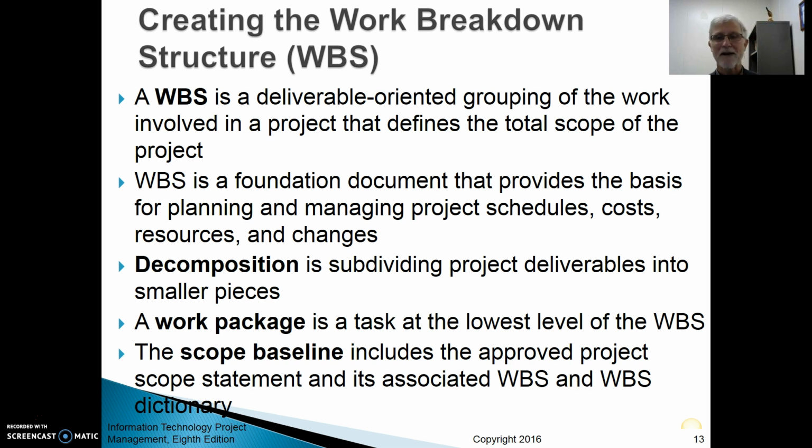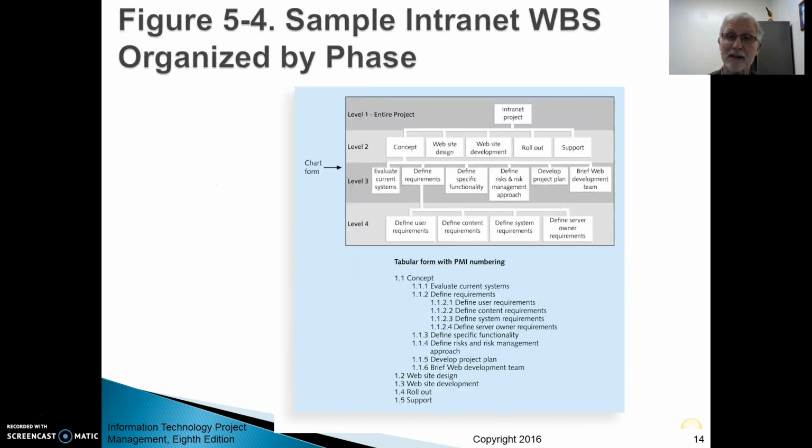And then a scope baseline is, once I've got this work breakdown structure, it just says, hey, these are the activities we're doing, and we're going to store all these definitions into what they call a work breakdown structure dictionary. So basically, I'm going to identify all of this information about this project, break it down into smaller and smaller pieces, up until the point we know exactly what each person's going to be doing. And here's just an example of somebody breaking a large project, an internet project, down into smaller and smaller pieces.